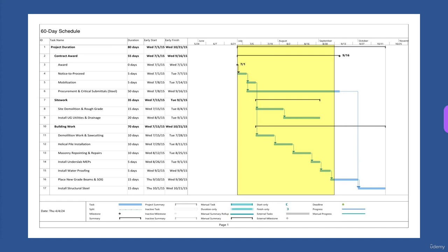So you can break down the 60 days into smaller activities so everybody kind of sees where everything's happening, especially when you're doing a lot of site work and there may be a lot of inspections, or maybe there's things owners have to do, especially if you're doing a state or a town job where you have a lot of town inspections. Maybe the town has to connect something. You might have a town electrical company, not a utility company. So this helps you out if you don't have the full baseline schedule. You just do a quick 60-day. So that's an example of it.